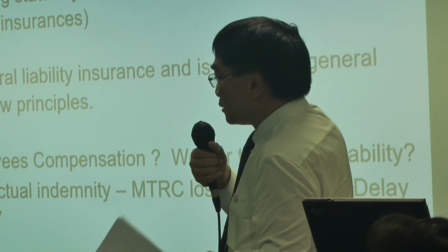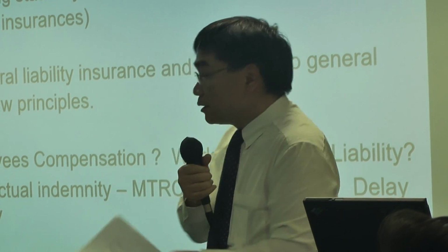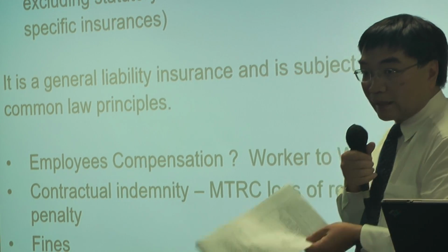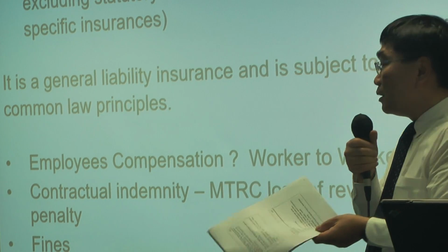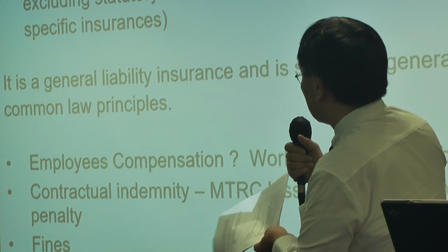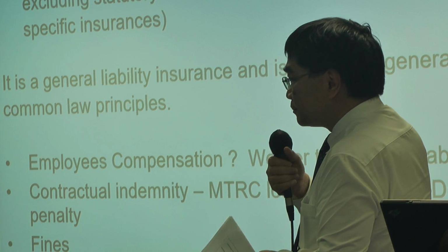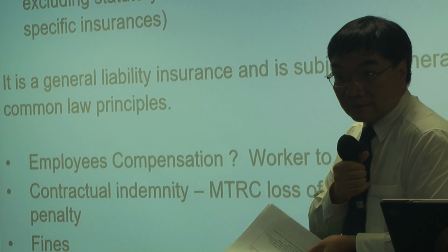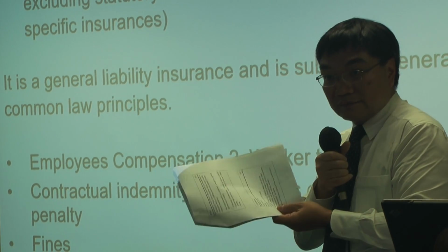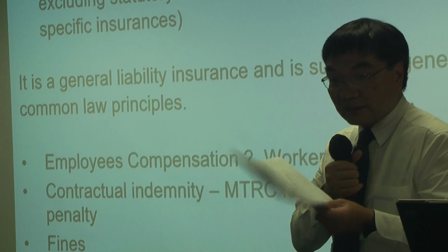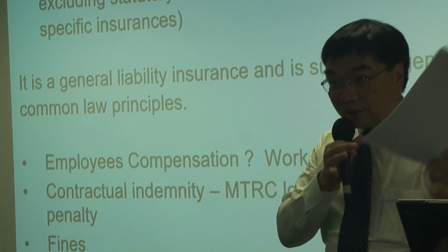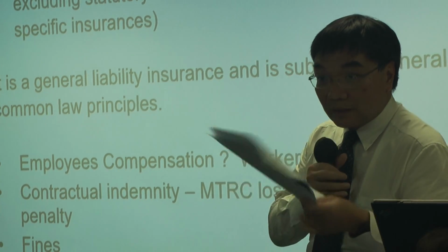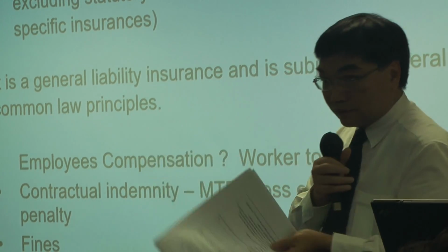So again, we talk about what is covered. The policy covers only the liability at law, at common law. Okay, not any contractual liability. How about the tort of negligence? Negligence is common law of tort. So it's covered. It is part of the common law system. Negligence is tortious liability. This is under laws of tort. Yes, of course, it's covered.